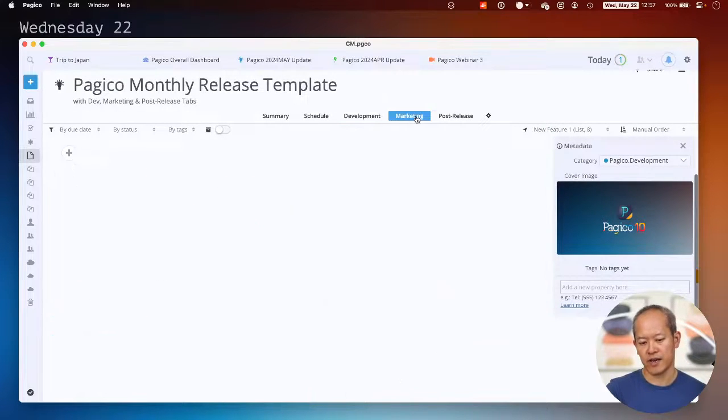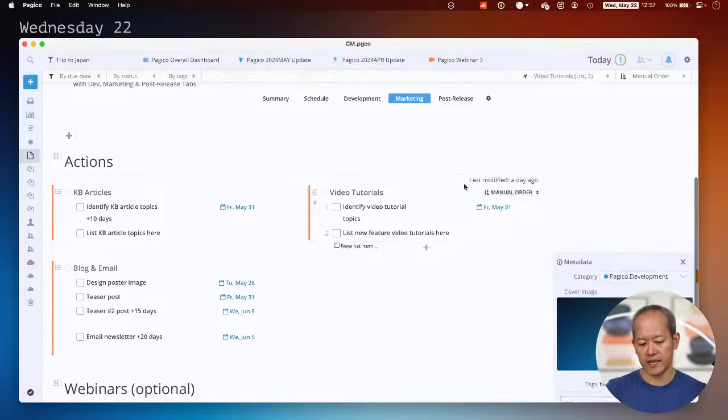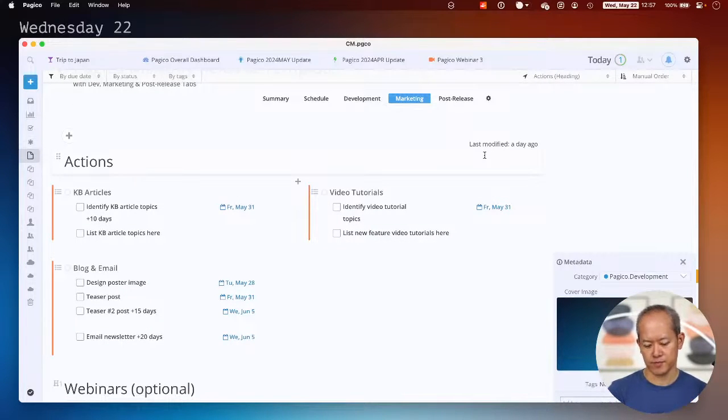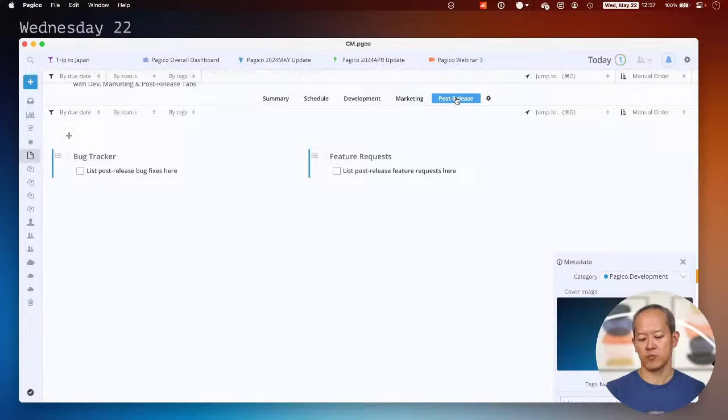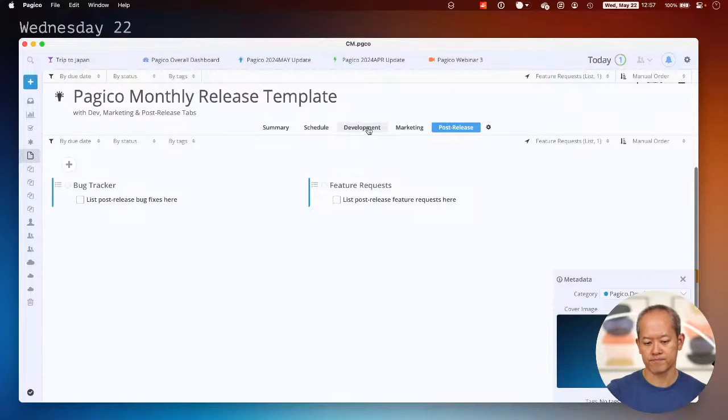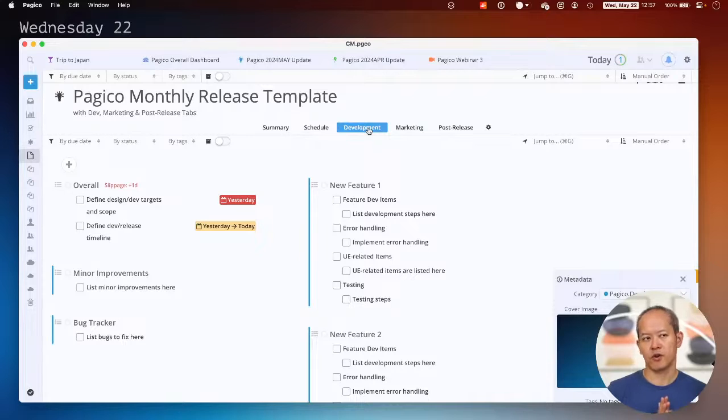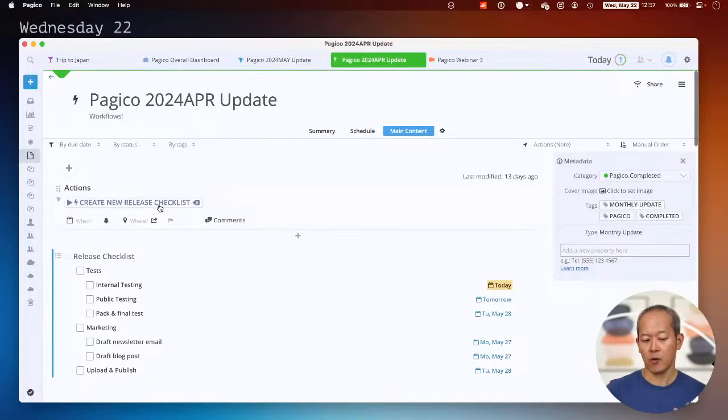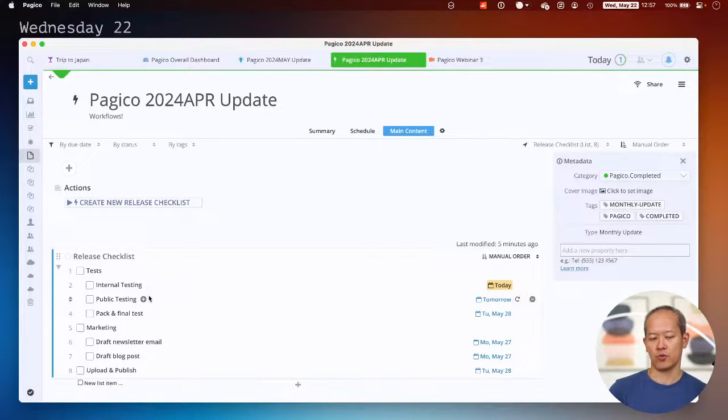And for the marketing, you would have the marketing related actions, and all of them are dated based on the time of the project creation. Okay, so this is why you want to use templates when you want total control on the presentation of your object, right? Workflows are more optimized for performing actions on the spot, right? For instance, in the example we just gave before, oh, I need a new list right now in that existing container. I can do that and it will pop right up. And if I do assign a tag to a task, then automatically the task gets assigned to a team member. So that is when you want to take advantage of the workflow capability.